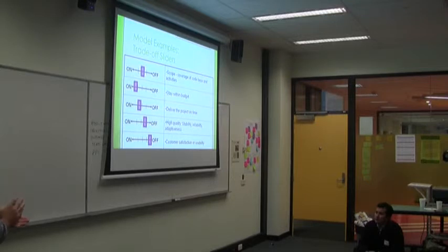But what you should never do is have 2 sliders that are exactly the same, because then you're deadlocked if you ever need to make a decision. So anyone that I'm soliciting to do this, I say to them, you cannot have equal sliders, tell me what's the most important thing. And usually, as soon as you see something that is the most important, so stay within budget above everything else, that is what you have to deliver to, and you will be successful if you deliver that. This is a really simple model that you can stick up on a wall, because that also shows agreement from all parties and stakeholders on your project. And if people want to change it, no problem.